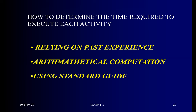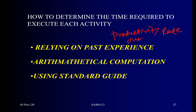The issue is: how do you calculate activity duration? Is it by guessing? No, it is not. It has a base calculation based on what we call productivity rate — sometimes people call it output capacity. It is the same thing. Output capacity could refer to the machine, while for human beings we refer to labor output.